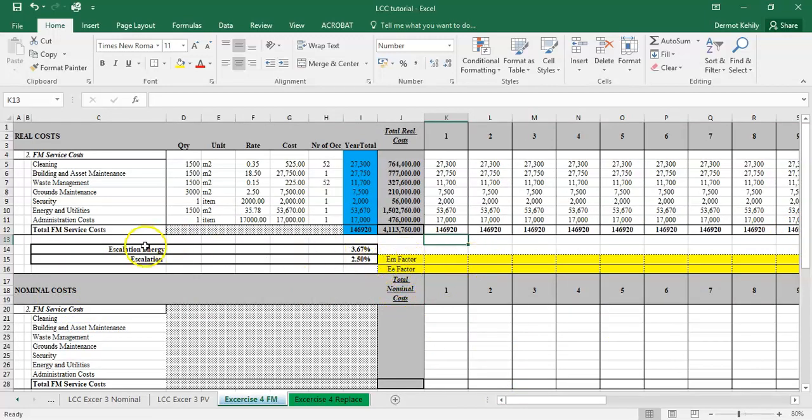So a couple of different factors here are different escalation rates. One for normal escalation, which would include construction materials and services. And then I have a different one for escalation of energy. So energy is slightly increasing at a bigger rate than normal escalation, be it our gas or electricity seems to be priced or increasing at a higher price than normal goods and services. So we're accounting for that here. Might start with the normal escalation factor, or at least the goods and services escalation factor at 2.5% first.